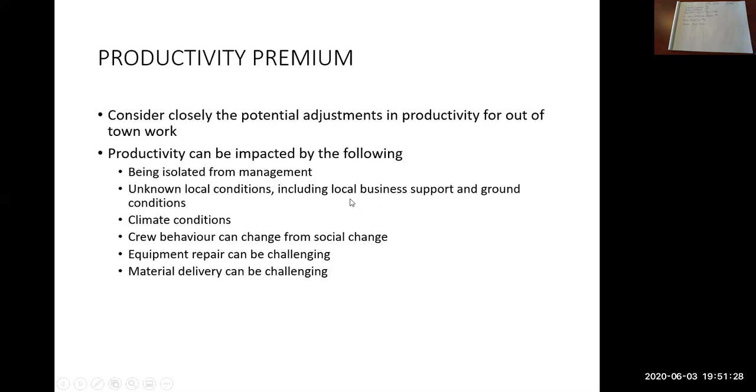Well, an example is you bust a hose on your excavator, so you need a new hose. So you need the mechanic to come out from town and replace your hose. Well, maybe the local business, so the mechanic, isn't overly excited about helping outside contractors. Maybe they want to help all their local people first, and they'll get to you in 3 days when they're finished helping everybody else. So it's hard to analyze that, but it's just something to keep in mind.